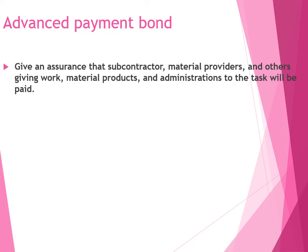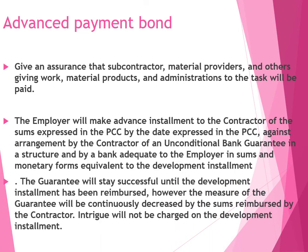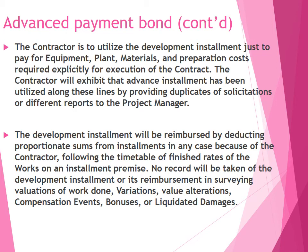Advance payment bond gives an assurance to the contractor, material providers, and other parties giving work that they will be paid. The employer will make an advance installment to the contractor of the sum specified in the PCC, against arrangement by the contractor of an unconditional bank guarantee in a structure run by a bank acceptable to the employer, in amounts and currencies equivalent to the advance payment. The contractor will utilize the advance payment only to pay for equipment, plant, material, and preparation costs required for executing the project.